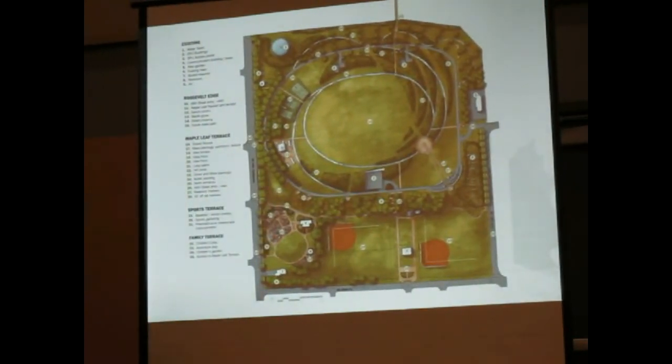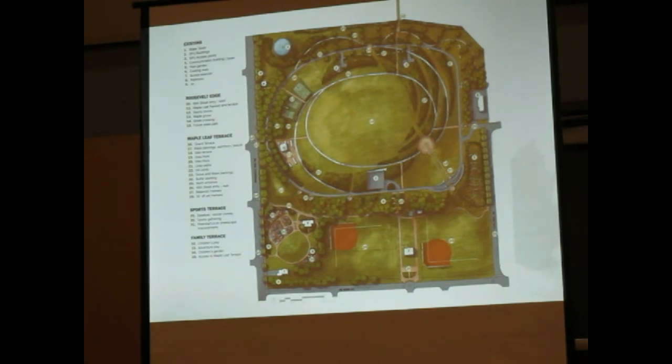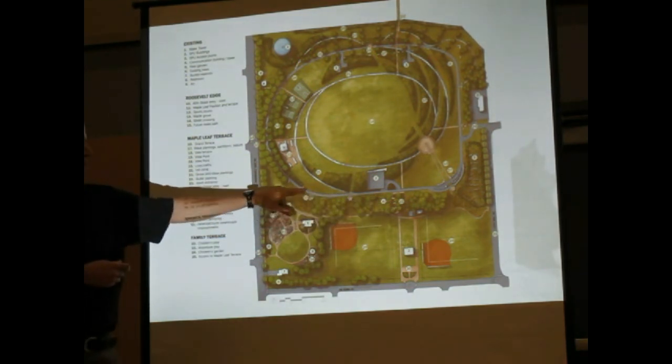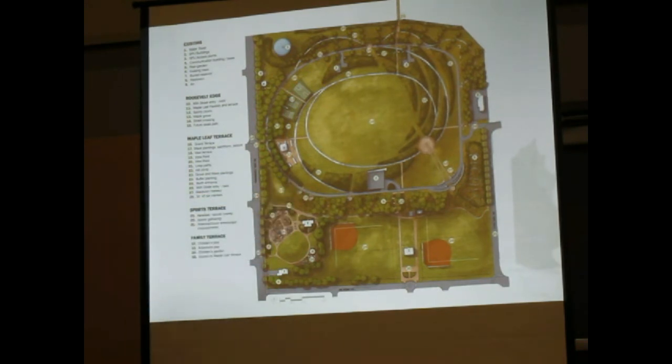The reason I made a comment about the existing stair being there is that they haven't torn it out. We were told it's going to get torn out in order to put pipes in there. It's still there today. They've torn up everything else. Maybe it's going to stay, and maybe it's a good call to Stephanie Murphy to ask, can we keep that stair? If we can keep that one, we have to put handrails on it to make it compliant with code, but then we could take the budget here easily and think about a connection in this area. So that's where we are, in how far we were stretching the dollars to get things in there.